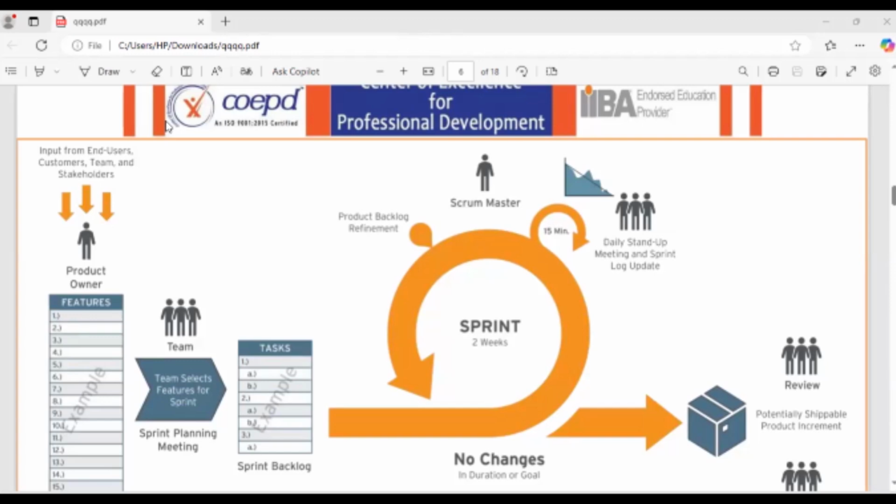User stories are written from the user's perspective. You can see the customer is a person related to the features or that product. Related to the customer, the product owner will write a user story: as a customer I want to log in so that I can make a payment. The person for whose perspective that feature is going to be developed, that is how they write user stories, converting that feature or requirement into the form of user stories.